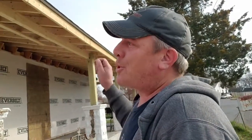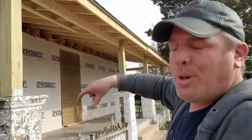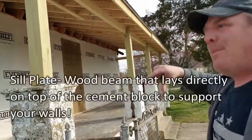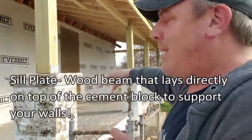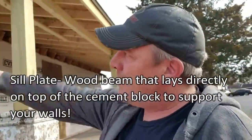Kris, you got some big... You know what? I want to know what happened right here, dog. So we bought this about 4 months ago, and it was a complete teardown. We went all the way down to the block. We didn't plan on doing it originally. We thought it was just roof structure. When we took the roof off, we realized across the front wall and the back wall, the whole sill plate was rotten. It was not even bolted to the foundation. Oh my God. So we ripped that down, went back up. The only thing we saved on the house was this sidewall.